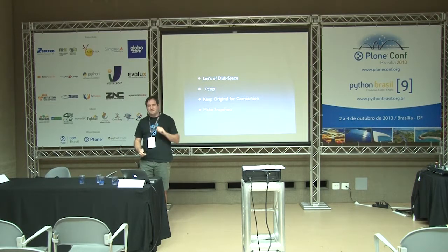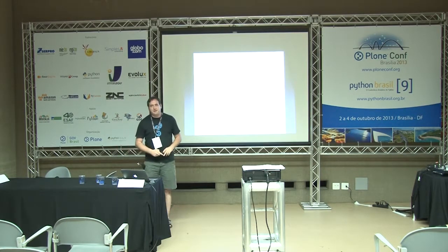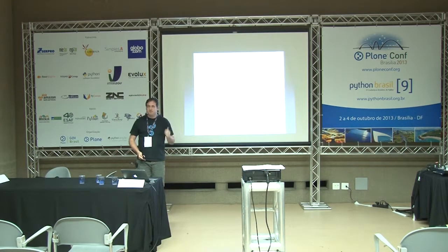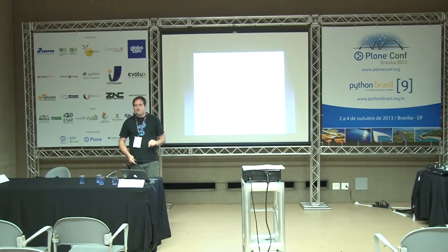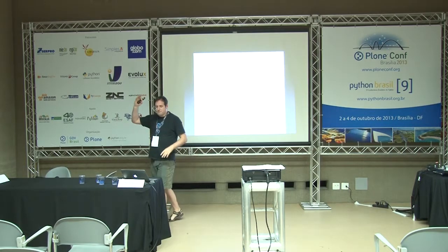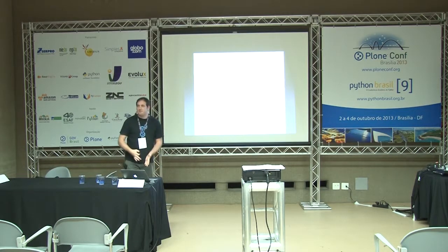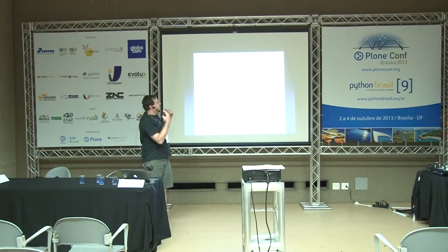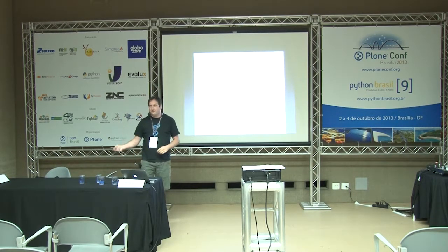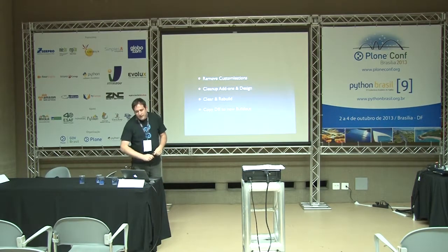And then take a text file, very important. This is an example for a text file, and make notes, and make every change that you have to make, make a note, make a new line, write it down, and this file will grow in size. It might grow endlessly, but at the end of the project, that file would be empty again. This is all the stuff you'll have to do by hand in the beginning, and then afterwards you automate it, and it'll be removed from the text file again. It's really important.